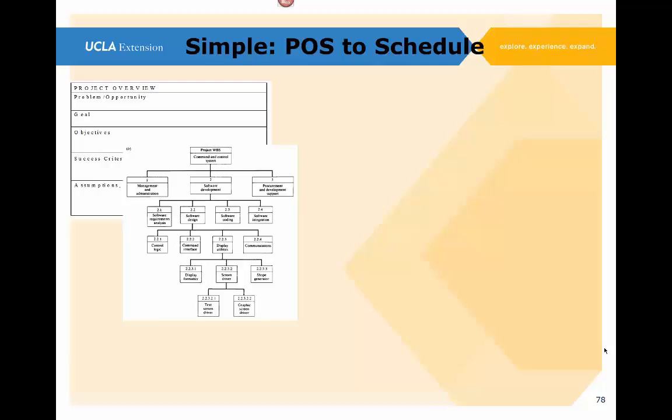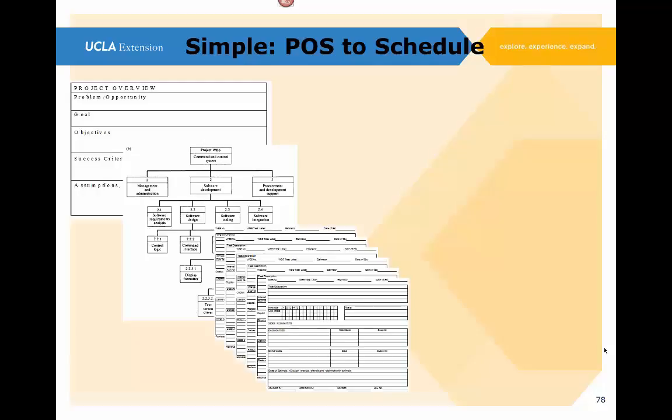Once we get our project initiated and we're authorized to start planning, then you want to go in and create the WBS by starting out with the project goal as the top level, and then starting to break that down, no matter what technique you use to break it down, by phases, function, however you and your planning team see the project. That's the way you want to break it down until you have identified all the tasks that have to be accomplished for the project.